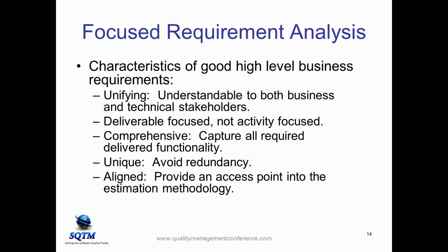It should be deliverable focused, not activity focused. So something like write test cases is not a good business requirement. It should be comprehensive. We want to make sure that we're capturing all of the required delivered functionality. But it also needs to be unique. We don't want it to be redundant so that we're double counting work. And finally, it needs to be aligned. It should provide an access point into the estimation process. It doesn't do any good to have a business requirement if it's not useful to us in terms of estimation.